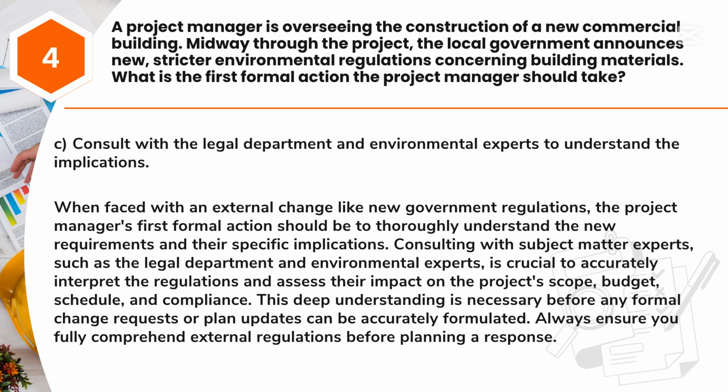Answer: C. Consult with the legal department and environmental experts to understand the implications. When faced with an external change like new government regulations, the project manager's first formal action should be to thoroughly understand the new requirements and their specific implications.